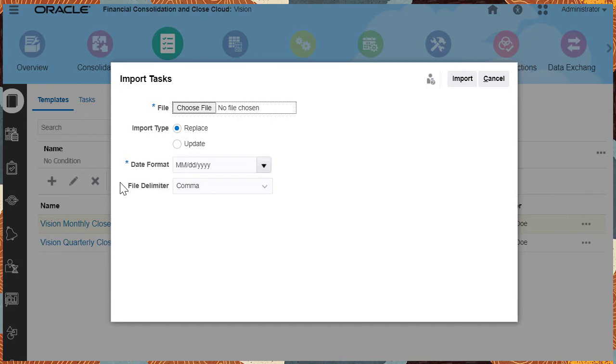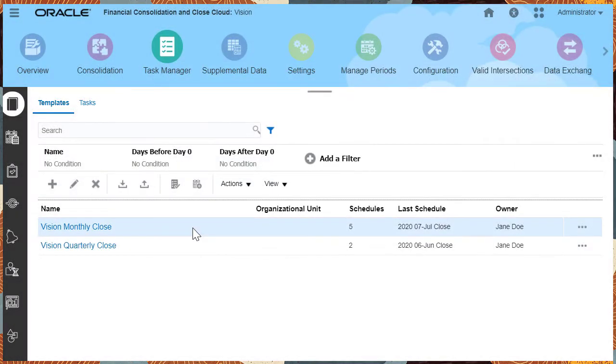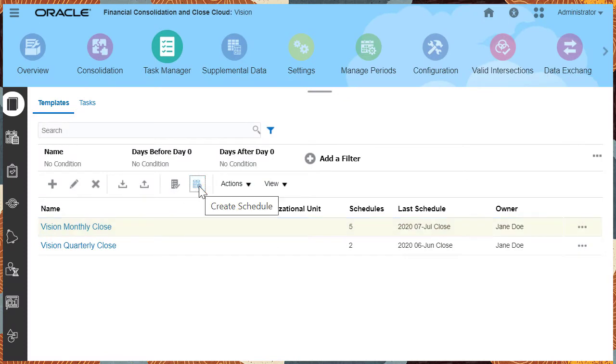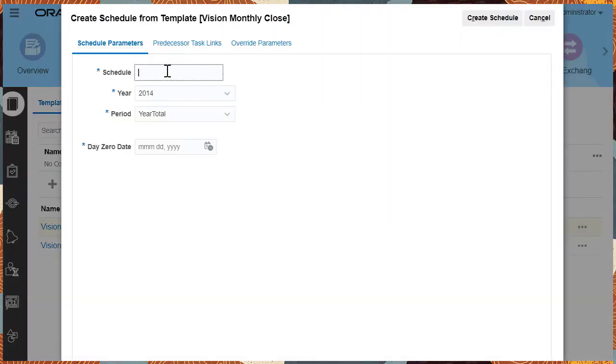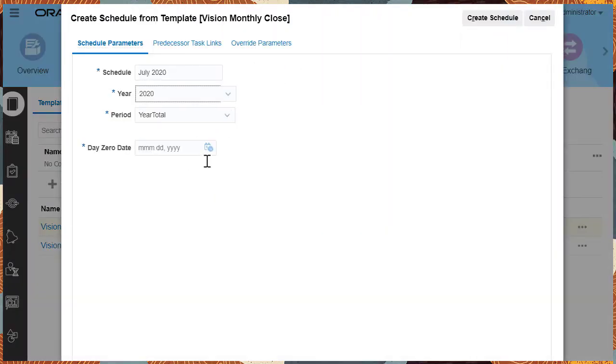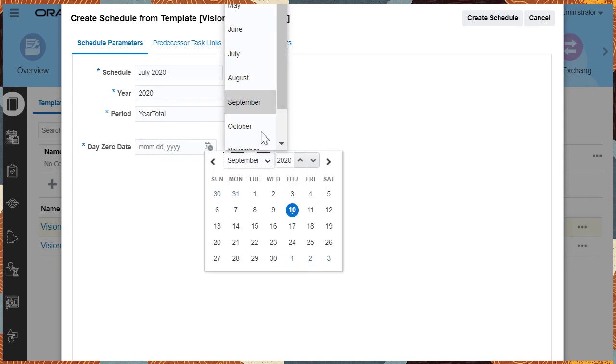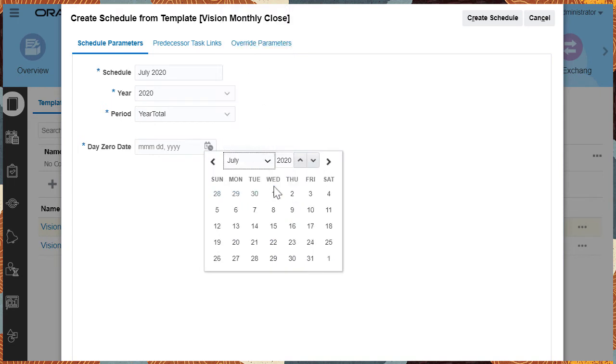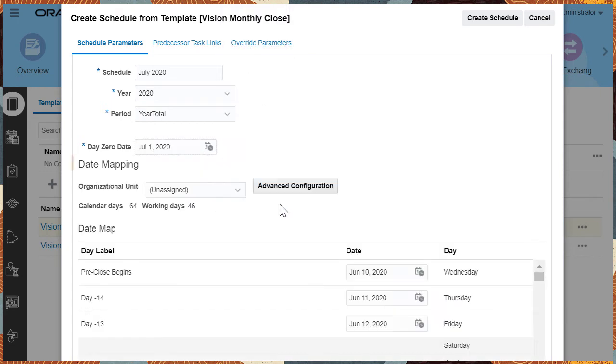After you have created a template and added tasks to it, you can run your stored business process by creating a schedule. Create a schedule by specifying the date parameter and relative day mappings.